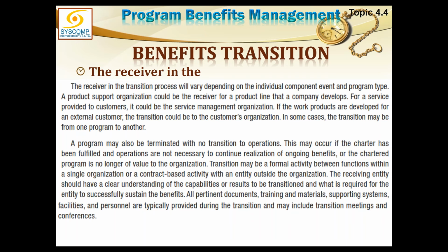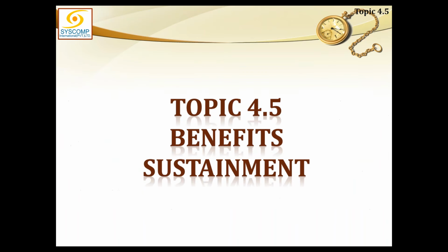So what is required for the entity to successfully sustain the benefits? All pertinent documents, training material, and supporting systems, facilities, and even personnel are typically provided during the transition and may include transition meetings and conferences.